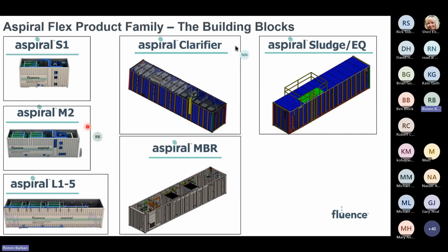One of the things that we have learned through the pandemic and through everything that has been going on in the world in the last 5 years is that the logistical component of any infrastructural project is taking more and more volume in terms of budget out of an overall project price. And if you're able to reduce that logistical component, you are able to reduce the overall price of an entire project. And this reduction is becoming more and more significant as we move forward in life and in the world and everything that's been going on.